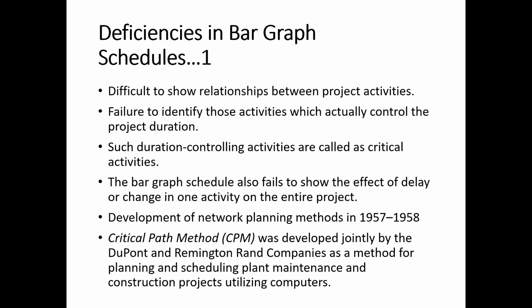However, normally it is very difficult to maintain it. We can show it at one time, but if we want to revise it, then you have to revise it from the beginning to show them again. So they can be shown, but it is difficult to maintain and keep showing it on a consistent basis.